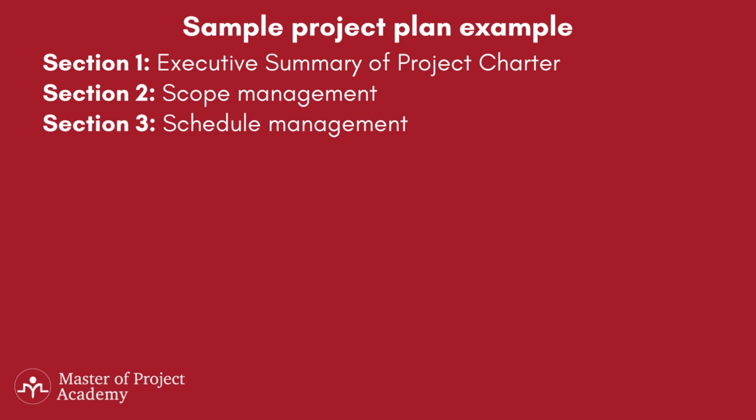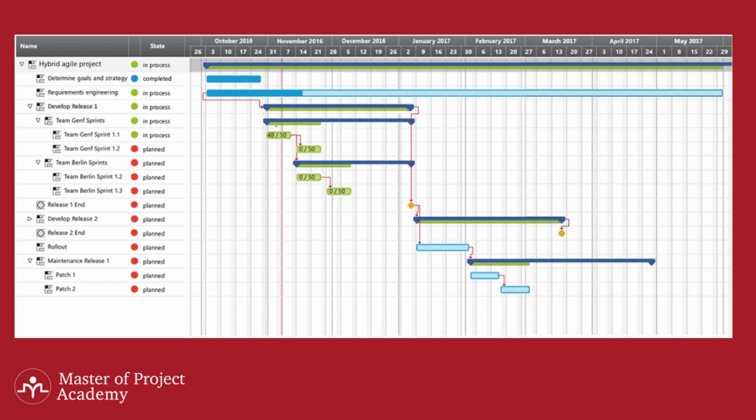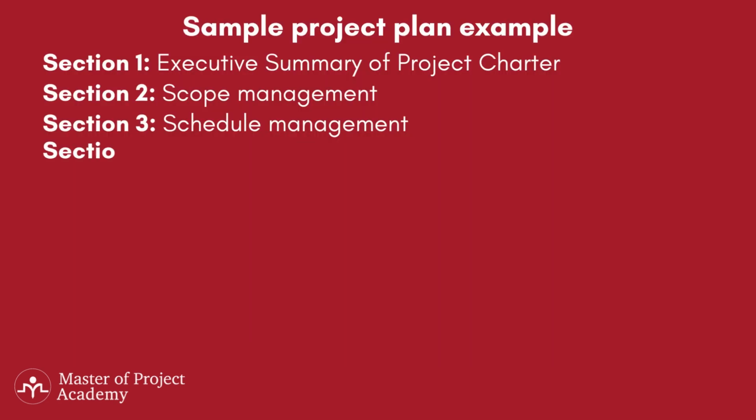For variances on executive milestones greater than 10%, the project may choose to use guidance specified by CPIC. See the CDC Project Schedule document for more guidance on project scheduling and for project schedule templates. The subsections of this section are milestones, which includes milestones and their estimated completion timeframes. Project schedule: the following diagram provides a sample project schedule. Dependencies describes the output of section 4 of this article. Activity relations.